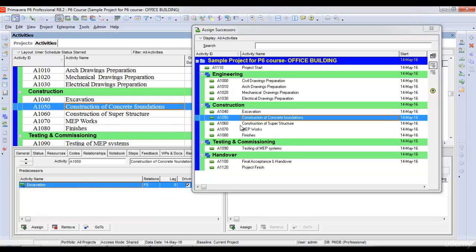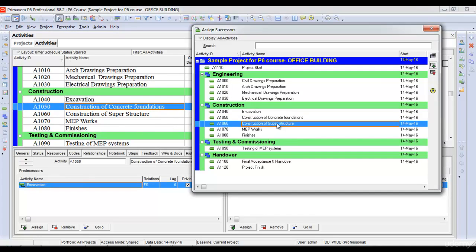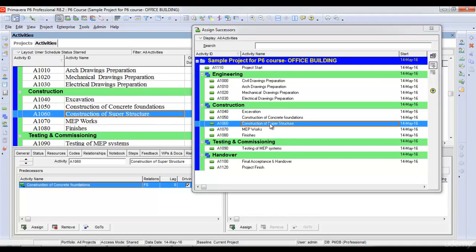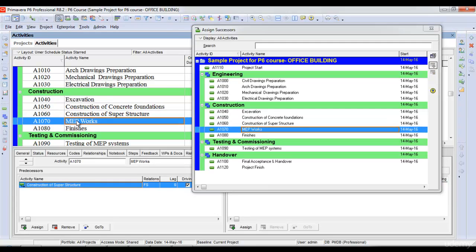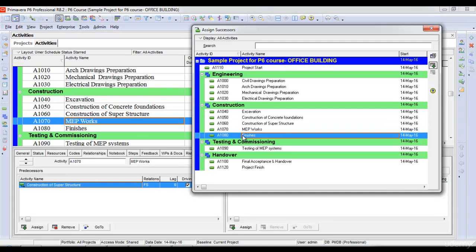After concrete foundations, we'll start superstructure. After superstructure, we'll start MEP. After MEP, we'll start finishes.